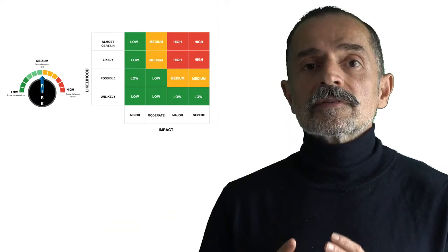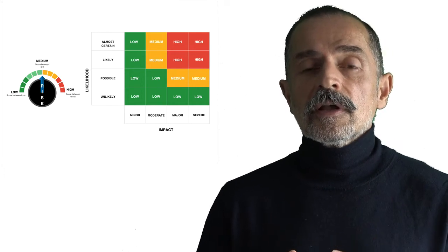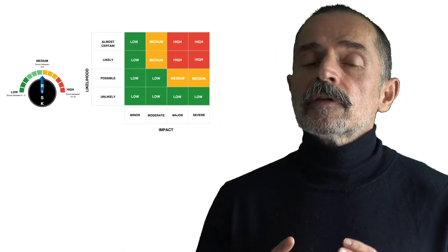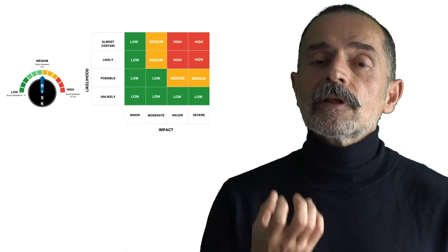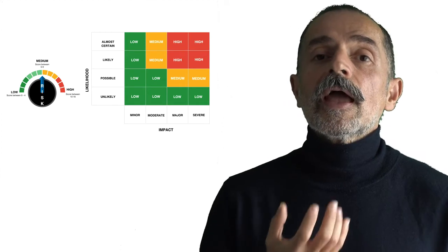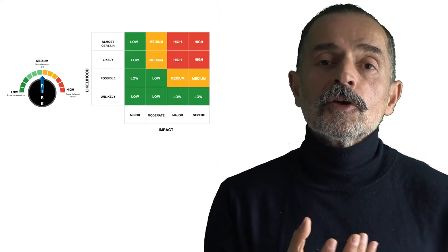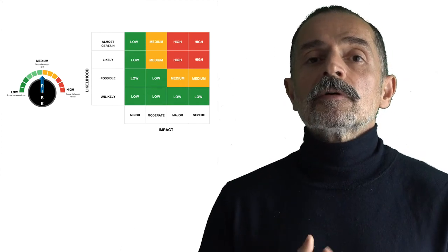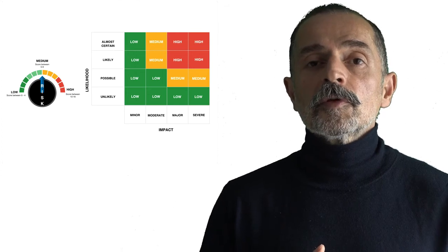It's through risk mitigation strategies and risk mitigation activities that we adapt the vertical logic according to a changing environment, because we add new activities to the project to mitigate possible risks arising from the project environment.